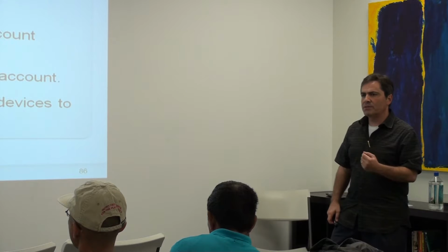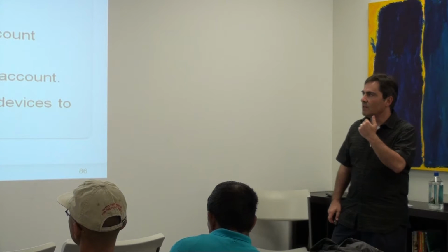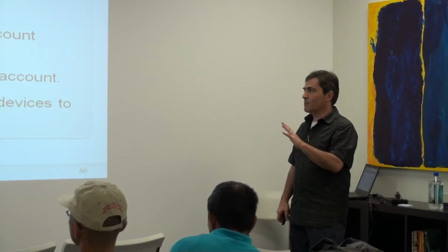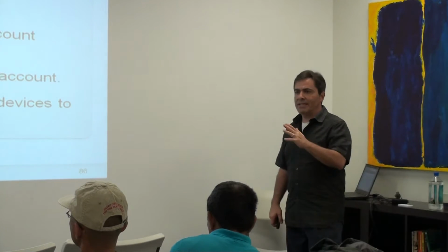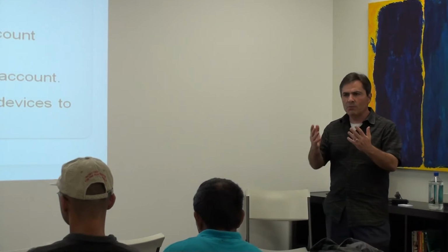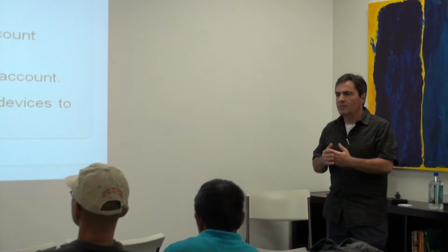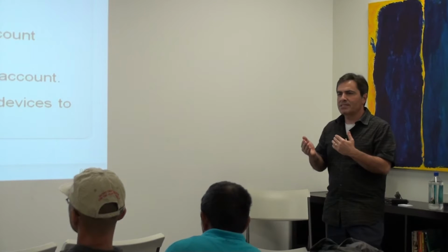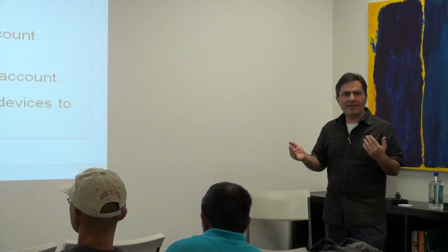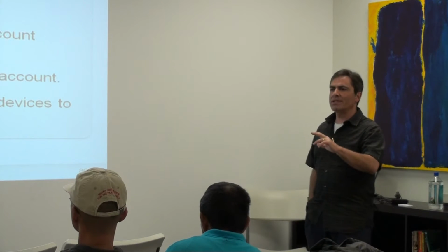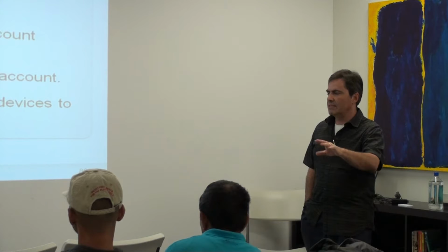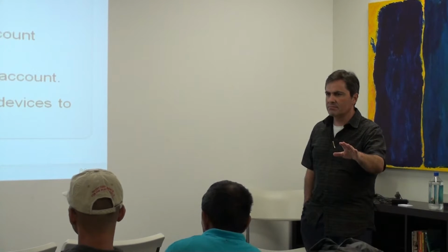Another common way to split user stories is by acceptance criteria. This is very counterintuitive, because usually we think of, hey, if I'm going to do something, it's going to be well tested. One good way is to actually split it by the different scenarios. So you can have a user story that says, okay, this user story only works in the normal case. It doesn't handle any errors.